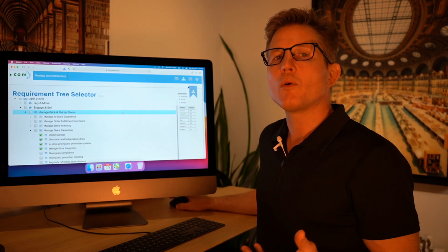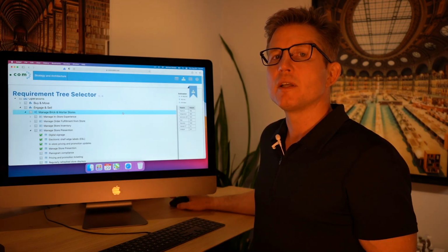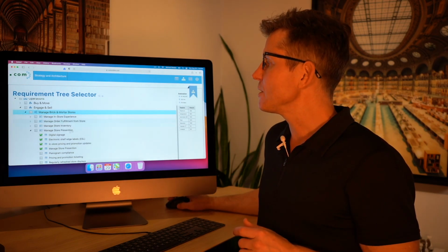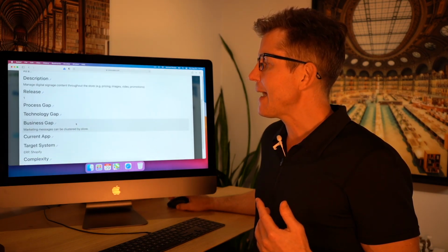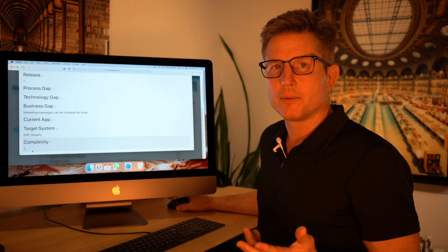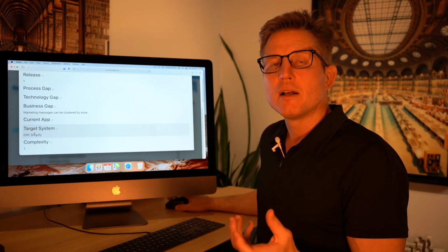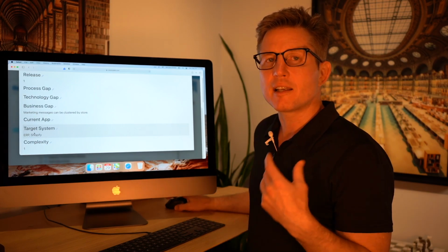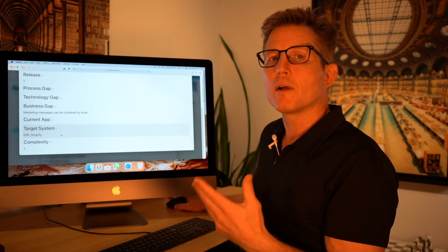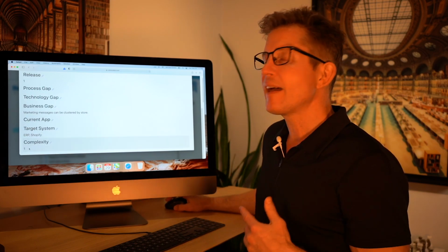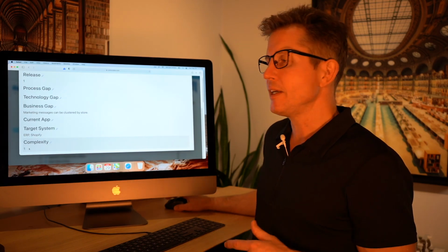We still need to include a way to have the requirements bottom up its information so that we can impact that on the estimation. Well, on the requirement, if you click the requirement, you can actually set a complexity level, and you can set the target systems. And the target systems have a variability of context that can be included in the calculation. The more systems, the more weight to the calculation. On top of that, the complexity factor will also have some play in the calculation.